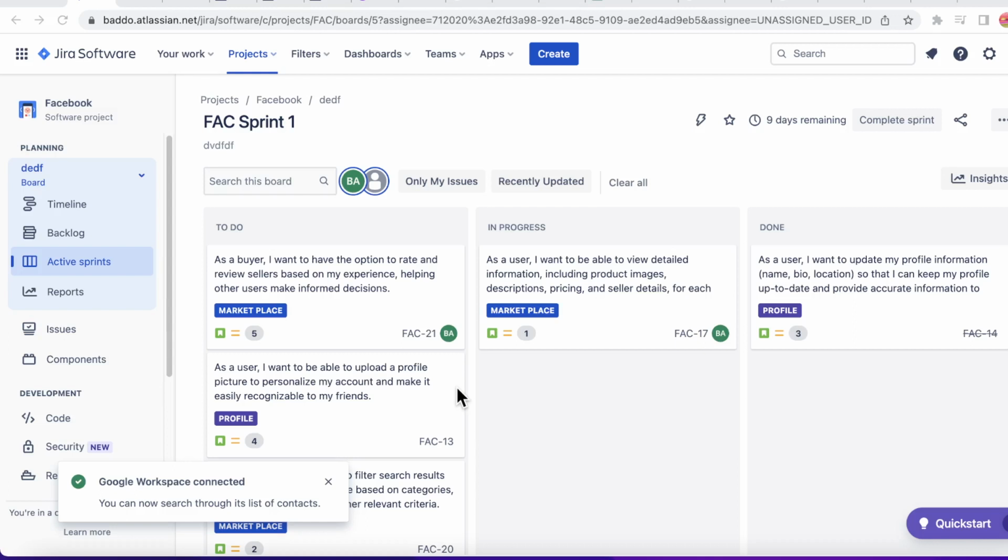And how do they do the daily stand-up? Before remote work, it was always done in the same place. Everybody stands and they just spend 15 minutes, not more than 15 minutes. That's how we were doing it. And still it should be 15 minutes, okay? But because now we are not meeting, we are remote rather than co-located, we do them on Zoom.